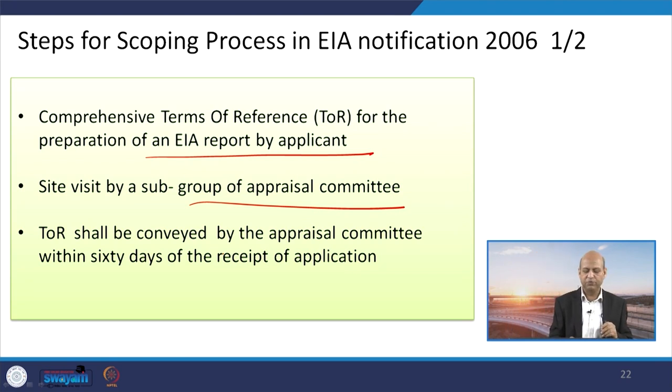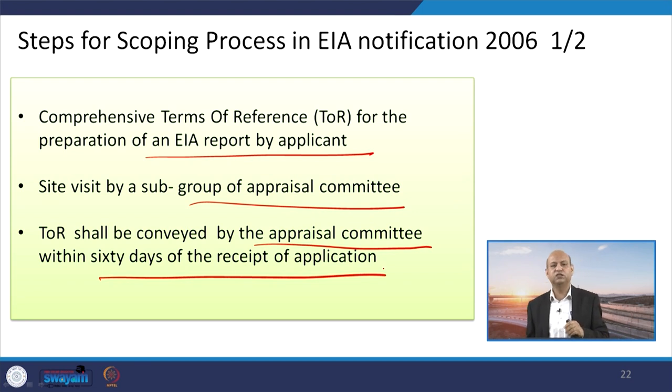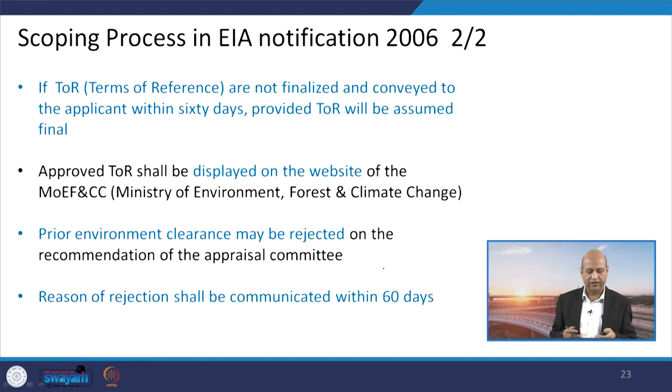Then TOR shall be conveyed by the appraisal committee within 60 days of the receipt of the application. This is the responsibility of the appraisal committee. If they want to give some comments on the TOR, whether they accept it as it is or want to make some changes, they have to give them to the client within a 2 month period.